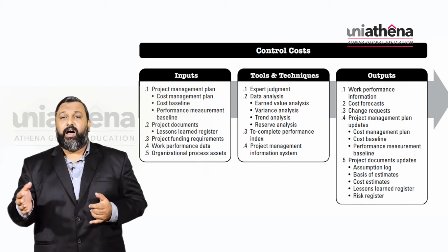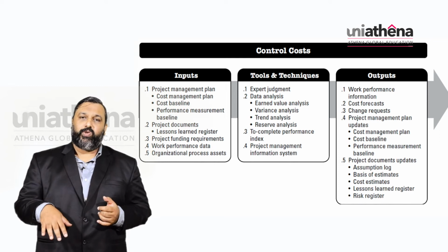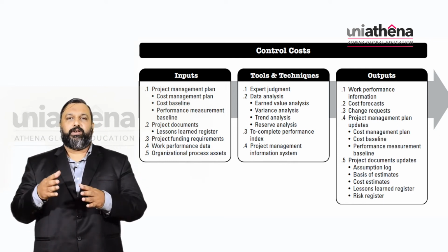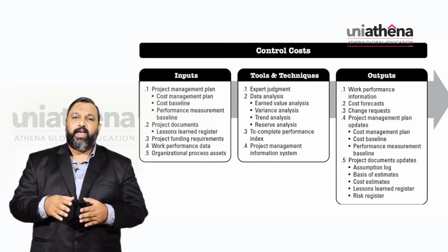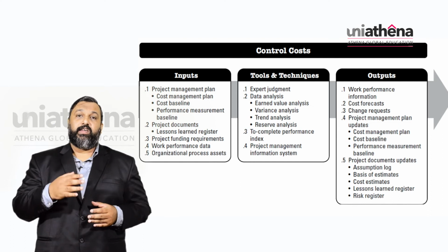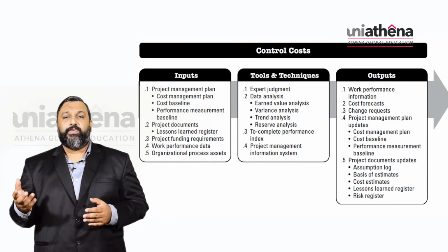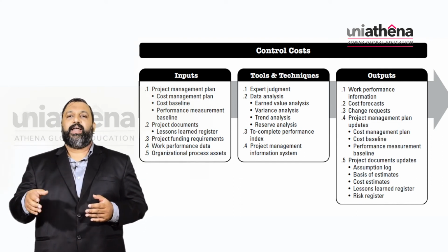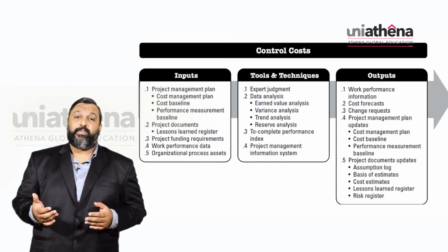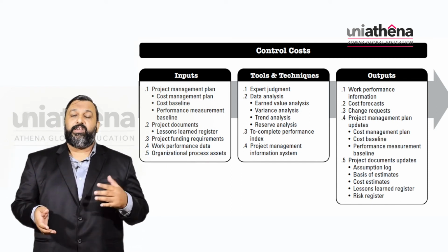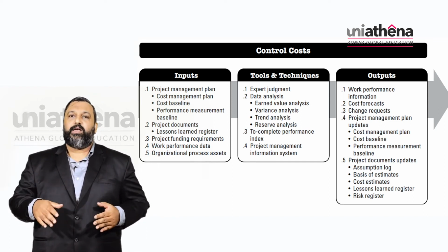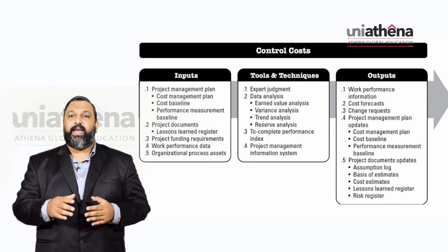Variance analysis, that is the variance between the actual cost and the expected or budgeted cost. Trend analysis, using historical data and data from similar projects, can again be a mathematical model. Reserve analysis, you have management reserves and contingency costs and all those things. On the basis of that, we do a reserve analysis. So that can be another tool.